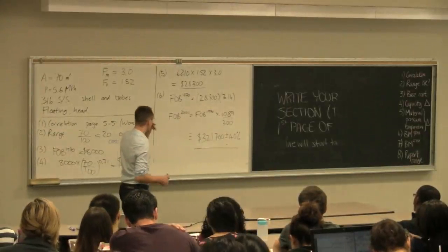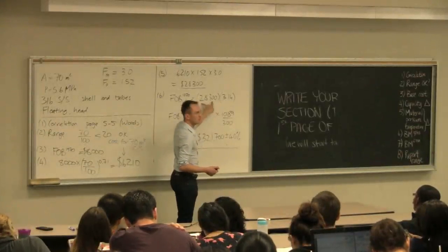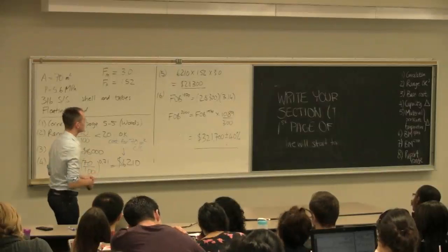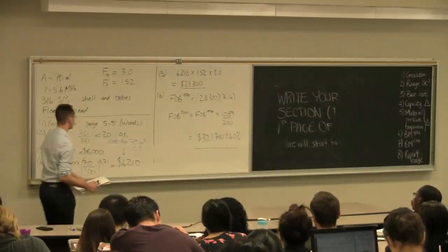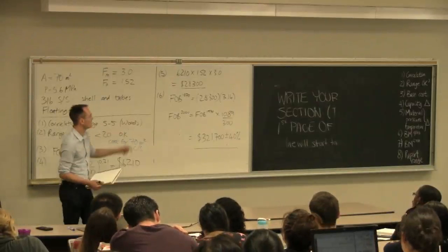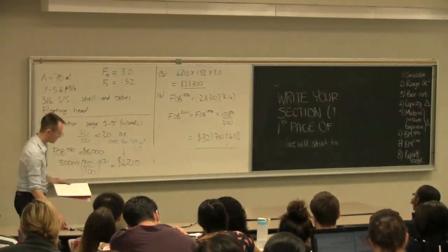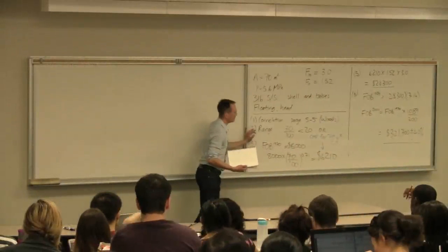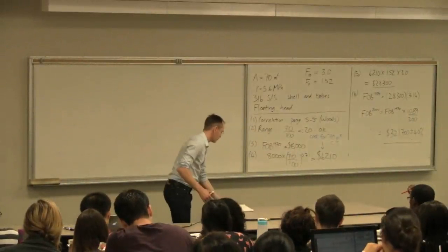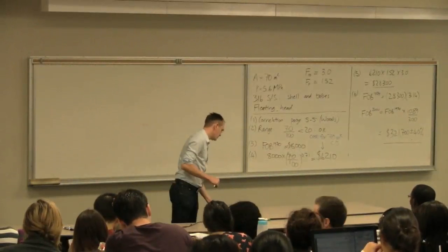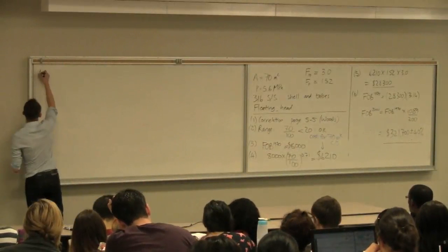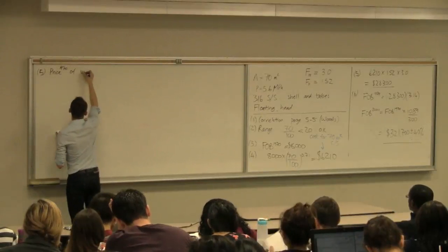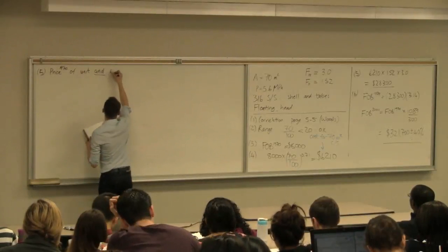This bare module factor, 3.14, is more appropriate to multiply by a lower number, because the installation of that unit is going to be the same no matter what the materials and pressure rating are. So the thinking is correct up to this point over here. Let's take it from step four, where we've estimated the capacity adjustment, and proceed from step five onwards in a slightly more appropriate manner. A more suitable approach is to say, back in 1970, what would be the price of the unit, step five, let's say what is the price in 1970 dollars of the unit and everything installed.